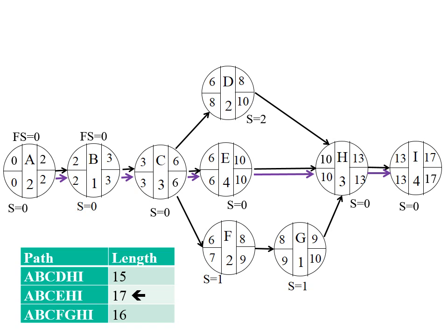Can you still start activity H by 10? Yes. Okay, so once again, how we calculate free slack is by looking at this number and looking at this number. Okay, so 10 minus 8, and the free slack is going to be 2.